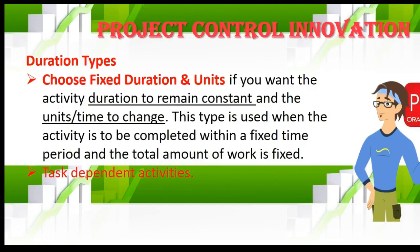We'll talk about duration types because they can be confusing. I'll tell you which one I use and what the default is in P6. The first is Fixed Duration & Units: if you want the activity duration to remain constant but units and time can change, use this one. This applies to task-dependent activities where you're concerned about duration, not the resource.